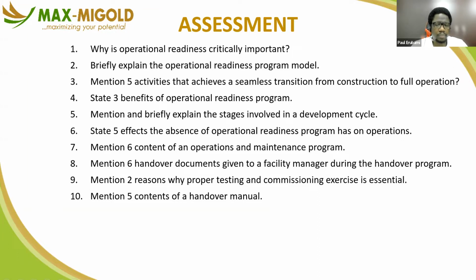By the time I finish doing that, I'm asking a question: if we were to create a ledge, a landing, where outdoor units can be stacked on every floor, and a service access to that point where those ACs will be accessed from every floor and maintained, how much will that extra concrete and door access cost, right? This is the number. But the difference between a 20K per year times maybe 500 ACs in that building, and a 190 per year times that 500 ACs in that building for 30, 40 years, it's not even comparable, but I'll do the numbers, right?